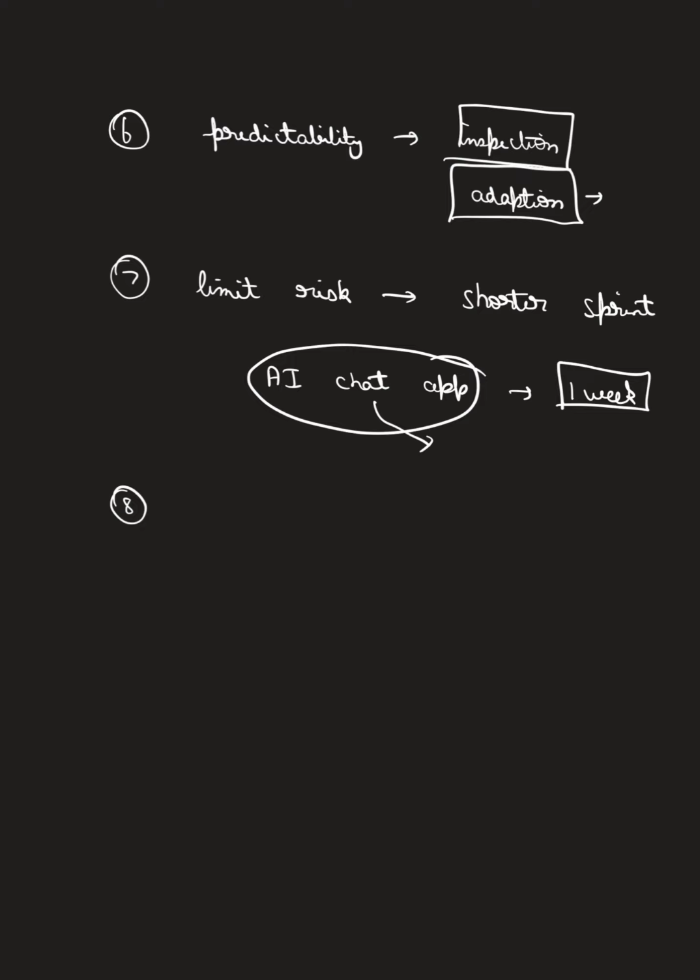See, you can do forecasting of your sprint by some techniques such as burn down charts, burn up charts, cumulative flows. Burn down means tracking work against time, how much work is remaining. Burn up means how much work has been completed. These are some techniques, but you need to keep this thing in mind.